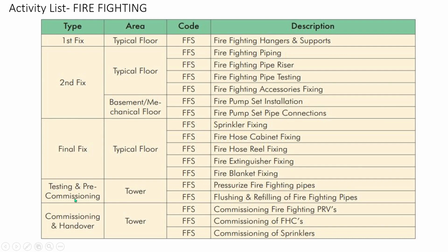In the testing and pre-commissioning phase, we will pressurize firefighting pipes, flushing and refilling of firefighting pipes. In the commissioning and handover phase, we will commission firefighting PRVs, then commissioning of fire hose cabinets, then commissioning of sprinklers.